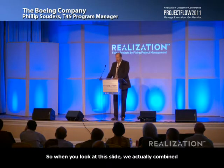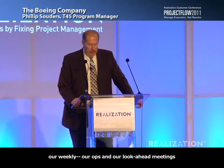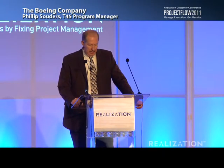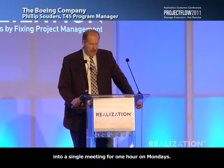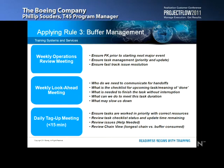So when you look at this slide, we actually combined our weekly, our ops and our look-ahead meetings into a single meeting for 1 hour on Mondays, and usually that's 1 hour max. In recent weeks and months, we've done it in a much shorter period of time as the team has become more adept at understanding the process.